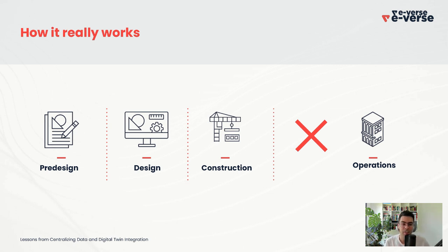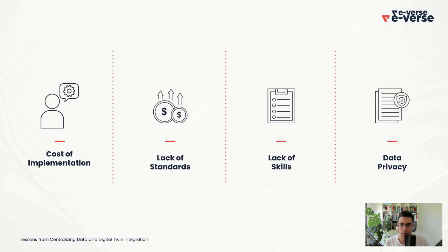So it was insane. The first lesson learned is you always want the facility manager to be involved as early as possible in the process. You cannot define a strategy on FM if you don't have your facility manager early in the process. Otherwise, it can happen what happened to us.